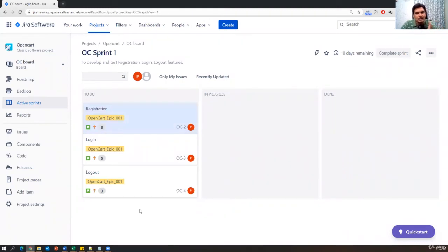Now from here, this is the responsibility of testers and developers, guys. Once a sprint is created and started, from there onwards, the developers' and testers' responsibility will be greater. But during the product backlog, creating the stories and planning the stories will be the responsibility of the product owner and scrum master. Once the sprint is created with committed stories, then the responsibility is with developers and testers.